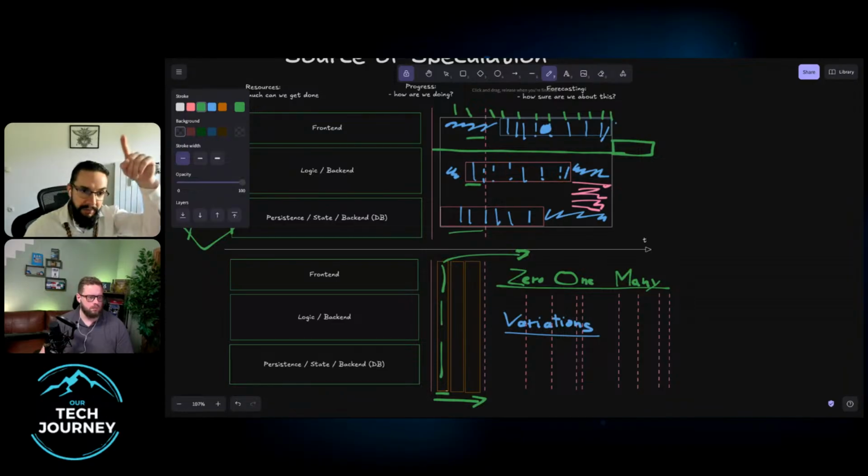Because the upper way of working has this temptation of, oh no, let's do it horizontally because there's no rework, because we never have to do something twice. And that is exactly what you don't want, because the business is naturally coming from a place where, if the requirements change, whatever you did prior to the requirements changing, without somebody seeing what you implemented, will probably be reworked, but you will resist reworking it. And it creates this constant pressure of, no, but I already have it done. I already have it this way. Let's not change it. It's already on the path to production, but it didn't finish.